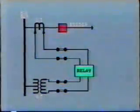Relays are often tested in place by secondary injection. In this test, source input to the relay from CTs and VTs is isolated, and instead AC current and voltage, where required, is injected into the relay to simulate fault conditions. In some cases, relays are removed from the panel and secondary injection tests performed on the workbench.